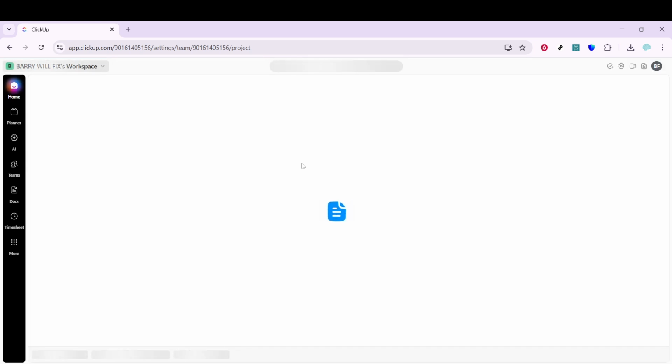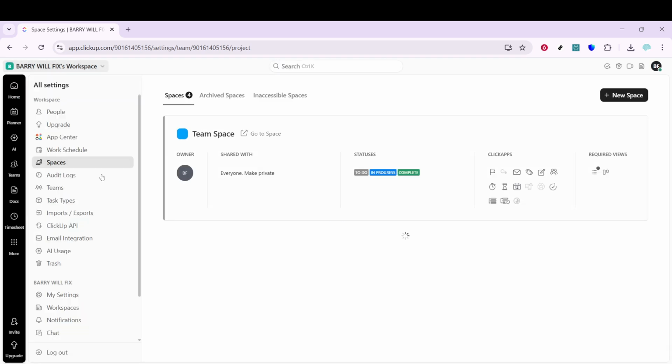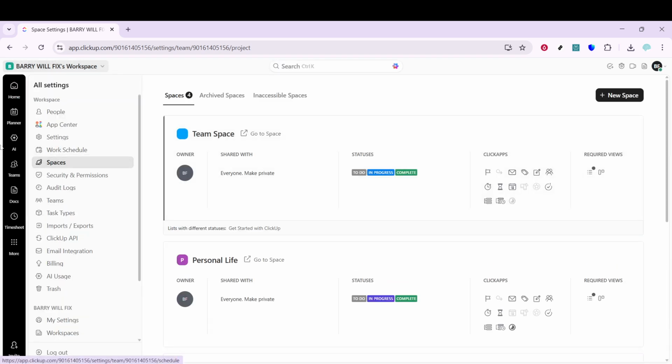If you can't click Spaces or don't see the sprints toggle, you might need admin or space manager permissions. Ask an admin to grant access or to enable it for you. If you manage multiple teams, consider enabling sprints in a test space first to confirm it fits your workflow. Then mirror the setup in your main spaces. You can toggle sprints off later if needed without losing your tasks.